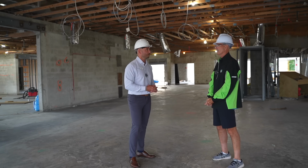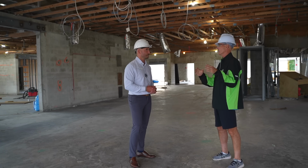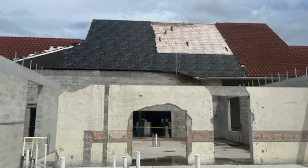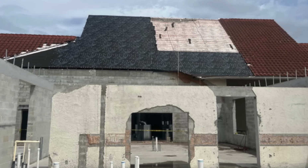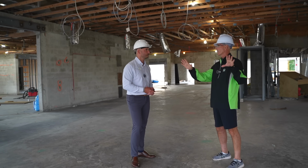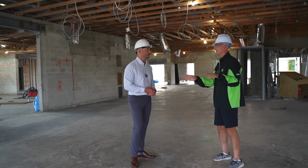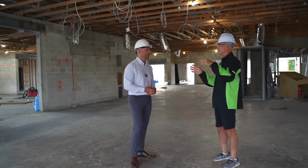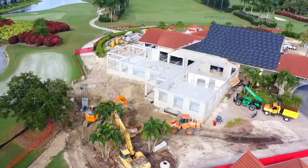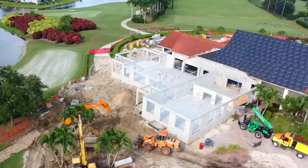So the roof contractor will not warrant the work if it's a partial piece of work. So if we took an old roof away, or a chimney in this case, and we left a lot of tiles there, but there's enough removed so they can attach the new roofs to it, they're not going to warrant that roof. So they said, we carried in our bid, we're stripping wherever there's a section of roof that's continuous. We're going to take all the tile off that roof, put a new waterproof membrane, frame the new roof structures into it, and then we'll tile the whole thing. So they don't want patches that are visually disturbing, where you got an old roof and a new patch here or there, and they don't want any discontinuity with the waterproofing.